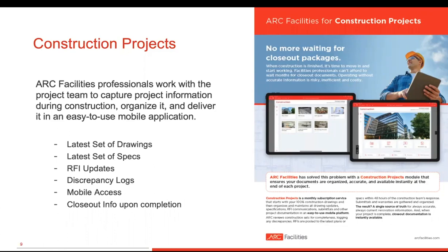And what's nice about that is with that visibility, your facilities team is able to see what's coming, right? At the same time, we're collecting all of that information, all that stuff that's going to end up in the closeout package. Our team is collecting that throughout the construction process. So when commissioning day shows up, when it comes time to turn those keys over, you on the facilities team, you already have the O&Ms, you already have the as-built drawings, you already have all of the documentation. You don't have to wait for that closeout package. You've got it. You can begin to take over that building and know something about it.